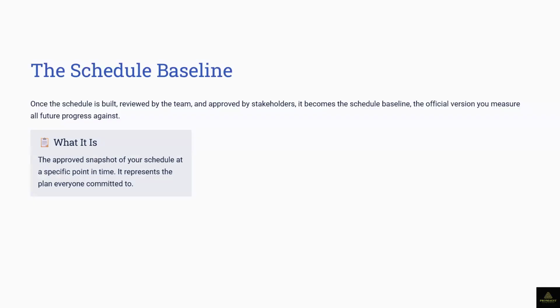What I mean by how do you adjust your baseline is basically a project is supposed to be 60 days and the client adds another item to it, and that item is going to take an extra 20 days. So it doesn't make sense for you to still be judging yourself at the 60 days. The baseline will have shifted. I can't be judging because originally we said 60 days, but that 60 days is based on a particular scope. Now, additional scope has been added. So what do we do? We reset our baseline, call it the adjustment. You call it rebasing.